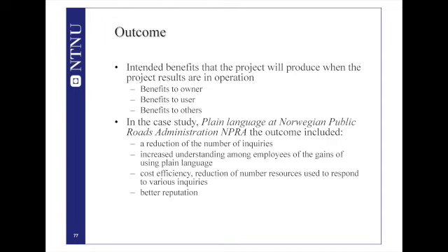They notice that when they send these 3 million letters, they get back a lot of calls because people couldn't understand the content of these letters. They roughly counted over 1 million hours they have to use on responding to inquiries by the customers who couldn't understand the meaning of the letters.